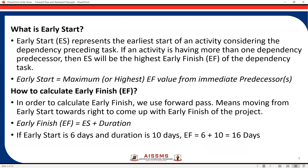Early start basically represents the earliest start of an activity considering the dependency of preceding tasks. If an activity has more than one predecessor, then early start will be the highest early finish of the dependency tasks. So if any particular activity is dependent on more than one activity, we have to consider the highest early finish of the immediate predecessors. Early start equals the maximum EF value from the immediate predecessors.